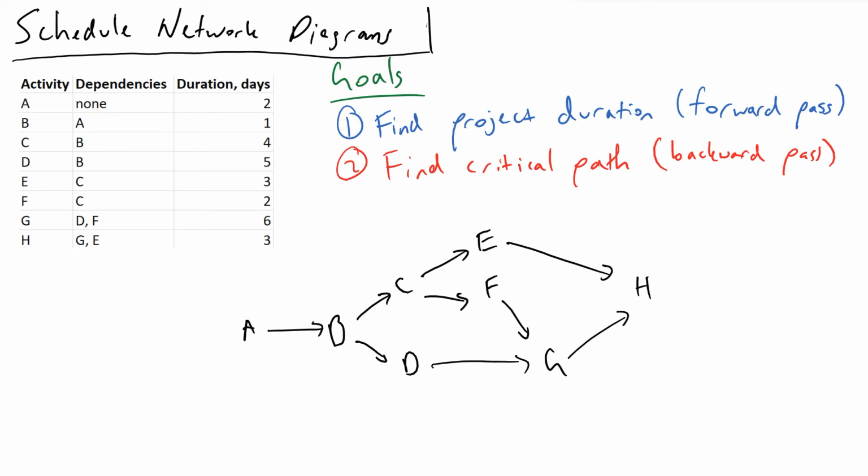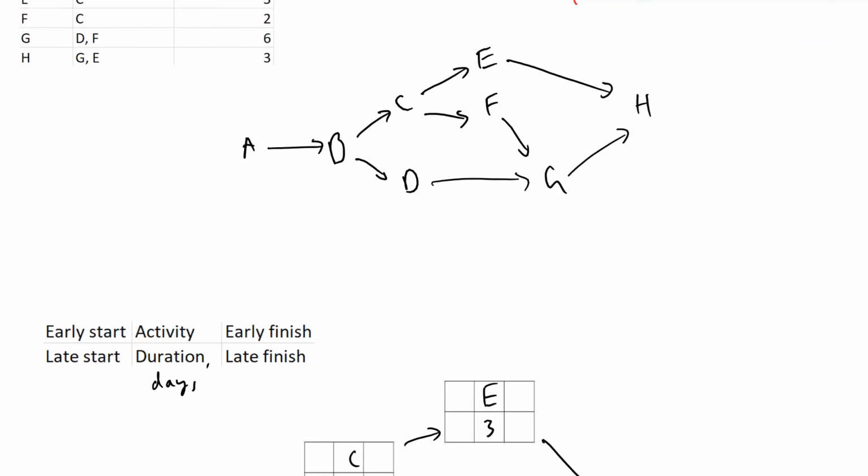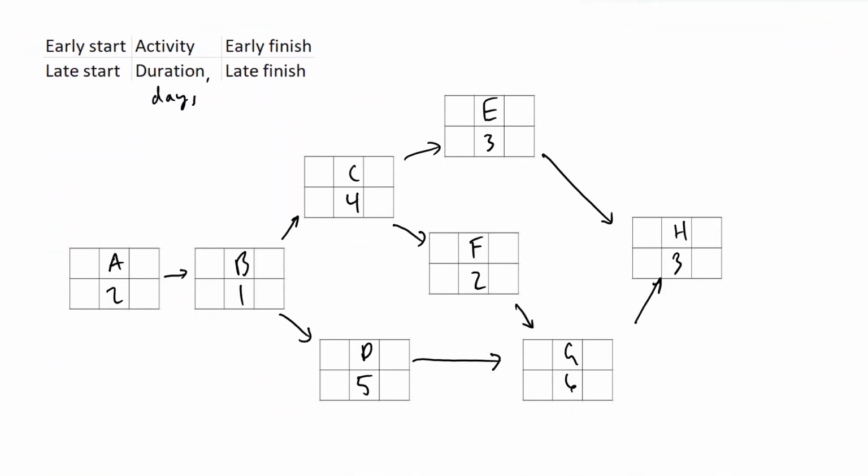The next thing we're going to do is make note of the duration in days for each one of our activities. This is where we're going to build our real schedule network diagram using these little 2x3 matrices that I've drawn here. In this case, I've already filled it out with the structure that we just derived above. In each of these, the middle column contains the activity and the duration. I've pre-filled all this out because that's all tabulated.